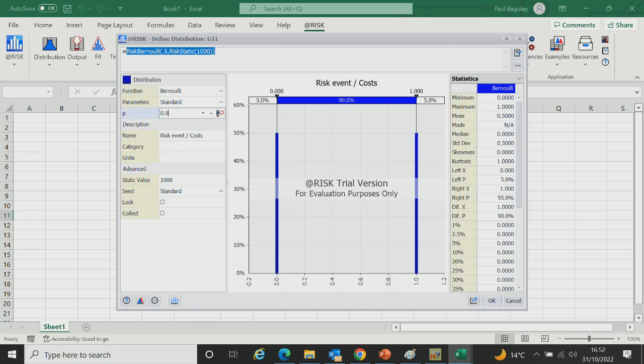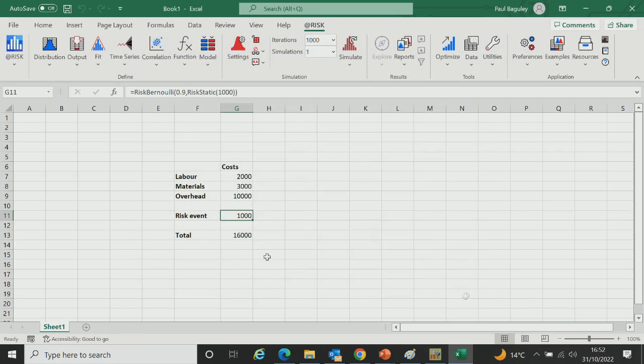So let's say there's a 0.9 chance of this risk happening, which means there's a 0.1 chance of it not happening. If it doesn't happen, it doesn't add any cost, so it's a zero. Like so, we call this the output. Final cost is the output. Like so. So now I've converted these into distributions,